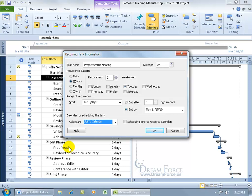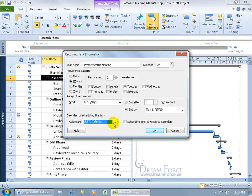And then you can actually have task calendars, which task calendars override both project and resource calendars. Now as far as a task calendar goes, if you really need one, all you have to do is go ahead and create a basic calendar. As we learned in an earlier training video, we created the calendar here and called it the spiffy calendar and assigned it to the project. You can go ahead and create another calendar and assign it to the task. So let me go ahead and click OK.